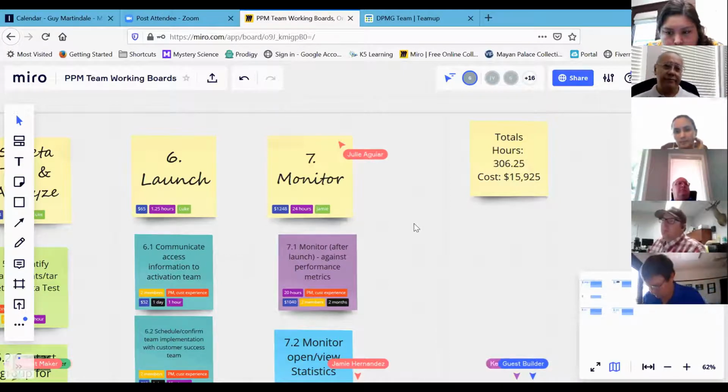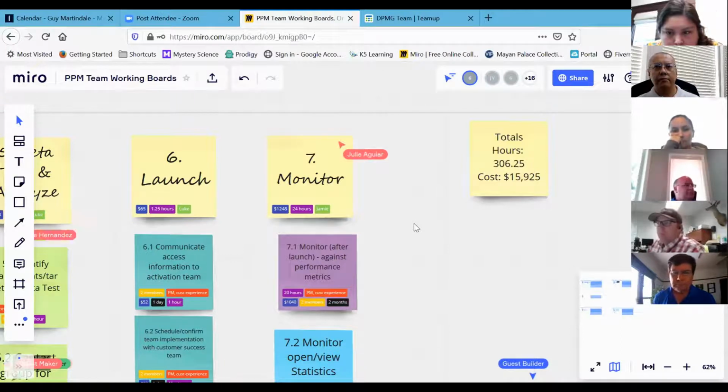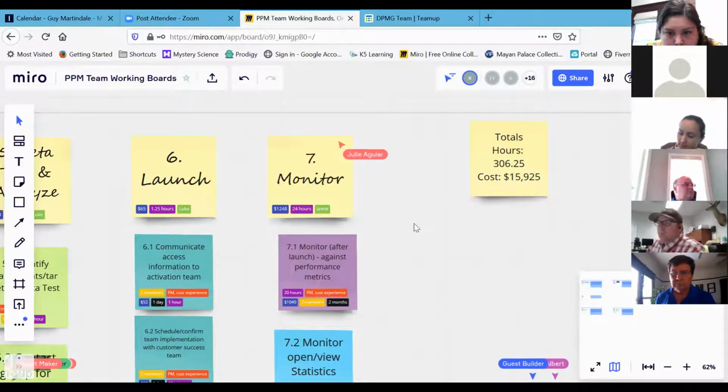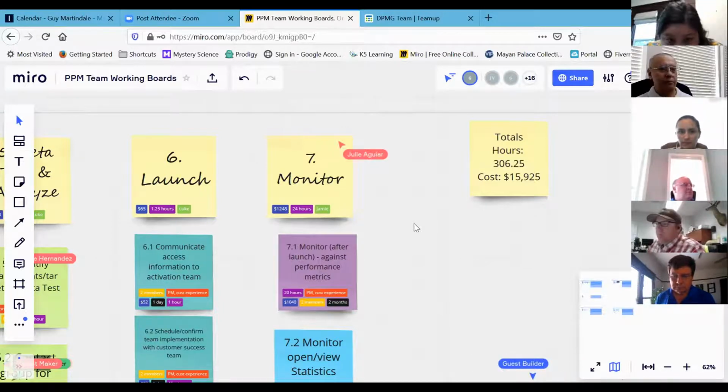Cool. So yeah, our original budget was 480 hours. This is based on some napkin math and guesstimation in the early part of the project. After the breakdown, we came to 306.25 hours of total work. Our project is pretty straightforward. We don't have materials or money. We don't need money for buying new software or outside subcontractors. It just encompasses hours worked, labor hours.